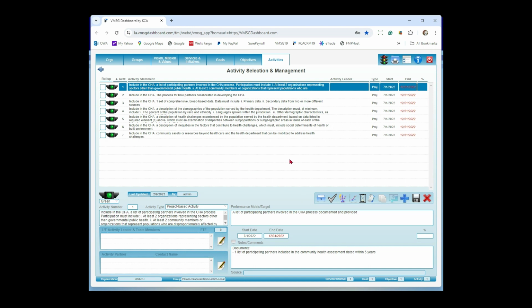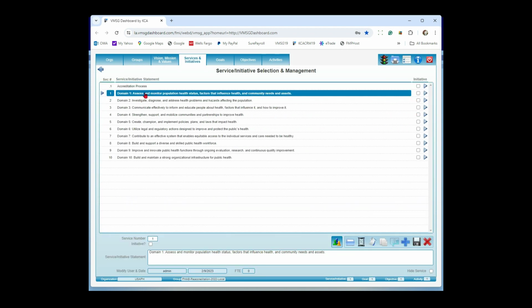Now, to get you guys going, what we like to do is you're going to tell us when you're planning on submitting final documentation. And then we typically back that up about a month. Just give you a little leeway in there. And we'll set that end date on all the activities for that cycle in there. Now, you're going to have the date in there, and then at the domain level, you're going to have typically domain leads or domain managers assigned. You'll tell us who they are. We'll push it all the way down. You can do this too, but we got a tool that pushes it all at once for you. We can put that all the way down to the objective and activity level. So now you've got the objectives and activities assigned to the domain lead.